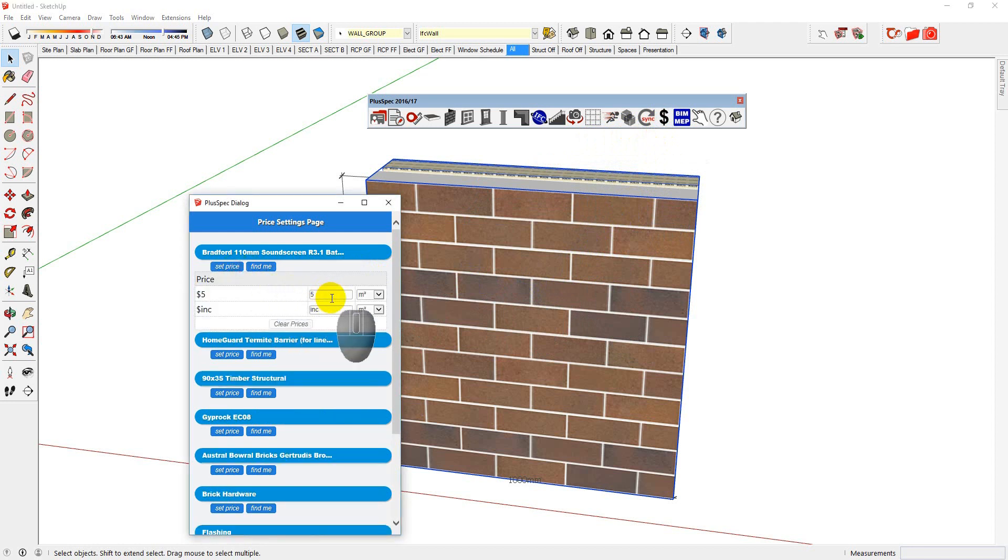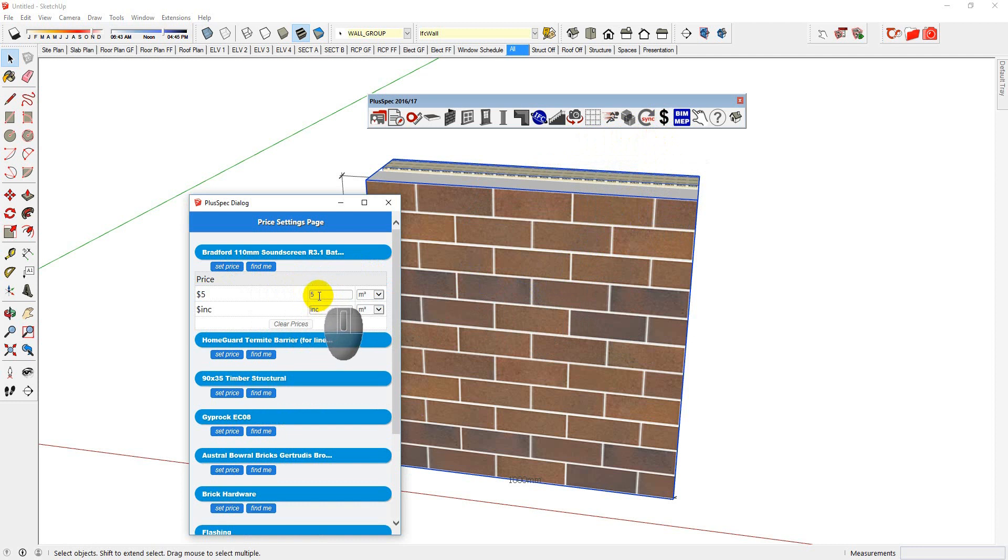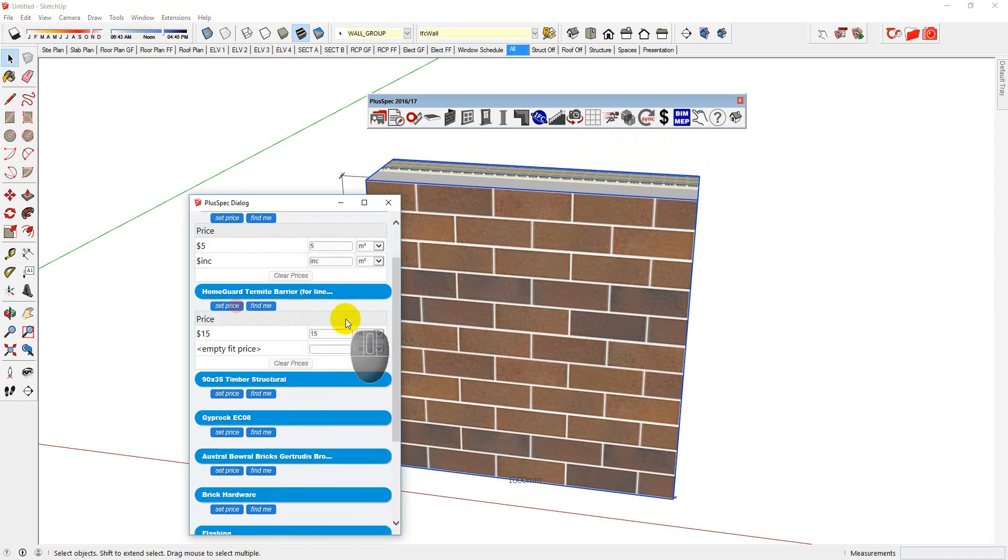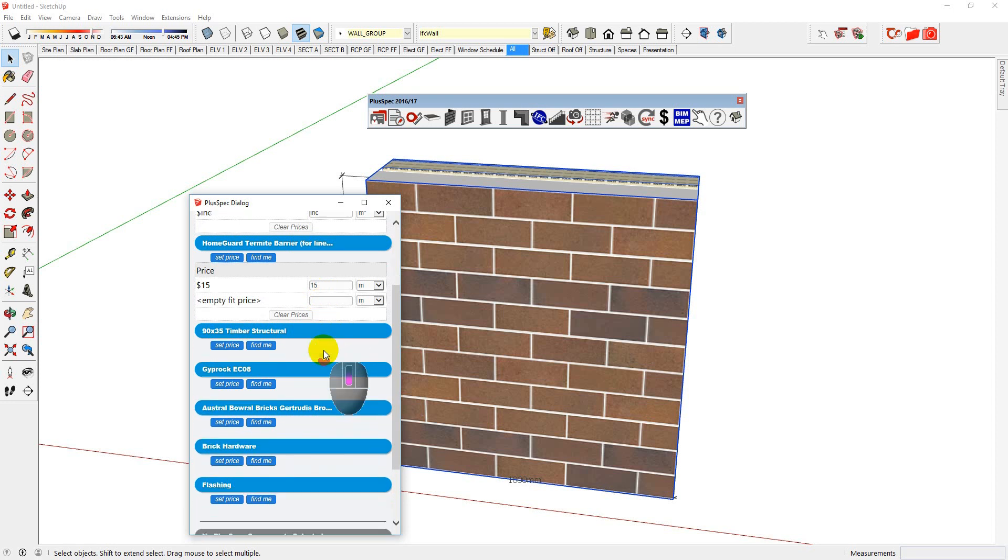I set my price from the installation. And I've already done it. And this particular job here, they supply and fit for $5. So I just put 5 in the top and just put included in the bottom. My termite barrier. And it's $15. And if I wanted to write included, I'll leave it at 0. It'll say $15. Or I can put in a price.